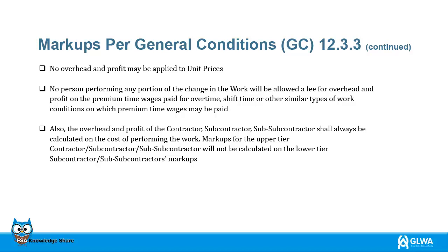Also, the overhead and profit of the contractor, subcontractor, and sub-subcontractor shall always be calculated on the cost of performing the work. Markups for the upper-tier contractor and subcontractor will not be calculated on the lower-tier subcontractor's markups.